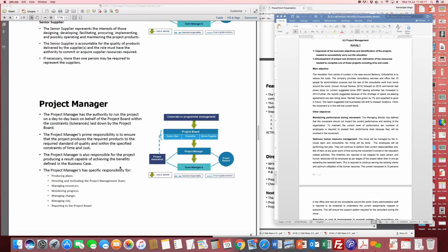Now, just going back to the same example of Burj Al Khalifa, when they started to go beyond the 82nd floor, what they found was that on certain days, wind and heat became a factor which hampered the construction work. And then he had to come up with an alternative plan of how all the material will be airlifted to the 82nd story, which will become a floor wherein all the raw materials will be stored. And slowly and gradually, they will start construction upwards of the other floors.